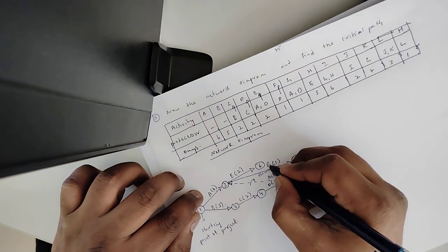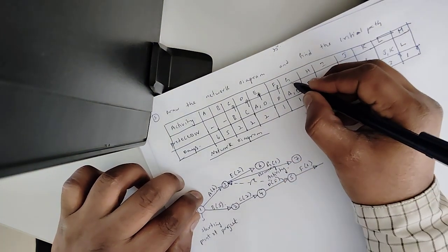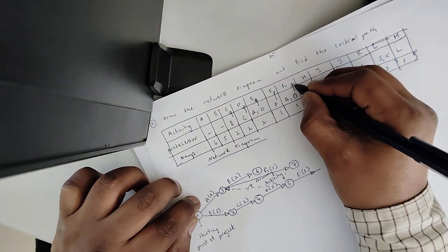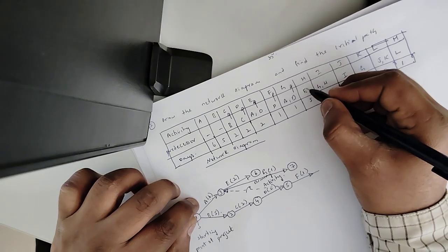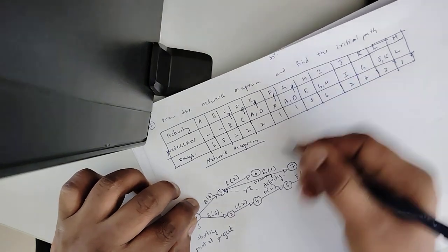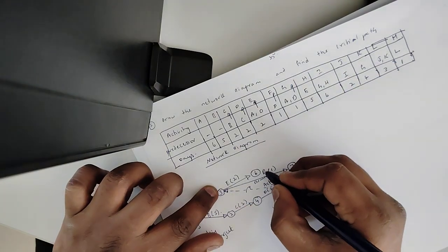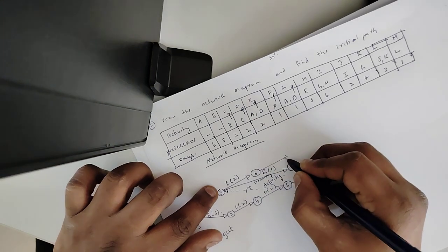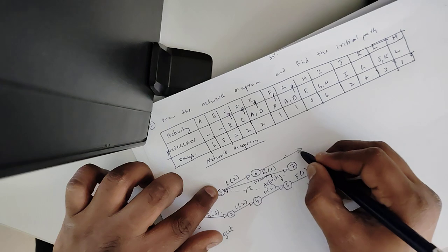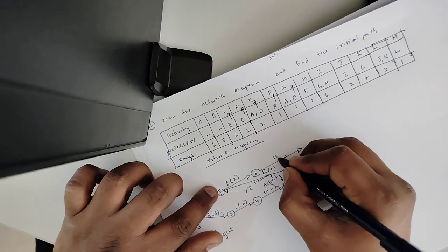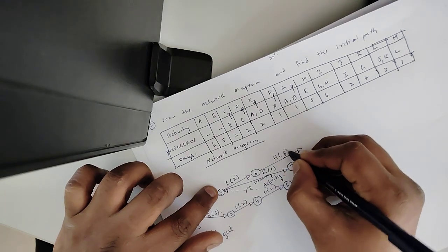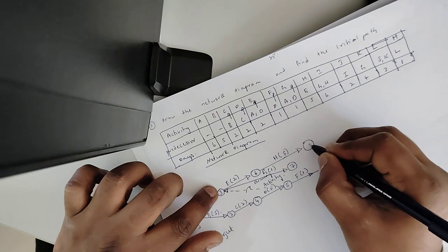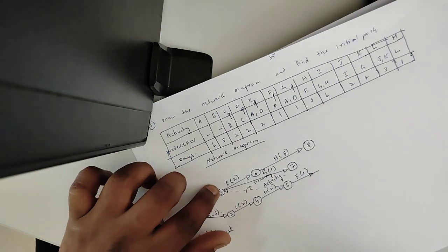Next, we will come back to the G. So G is over. Next H. So the precedence of H is E. So E is here. So I should draw a straight line, and I'm mentioning this as H. Of how much? 5 days. And I'll call this as 8 event. Is it fine?